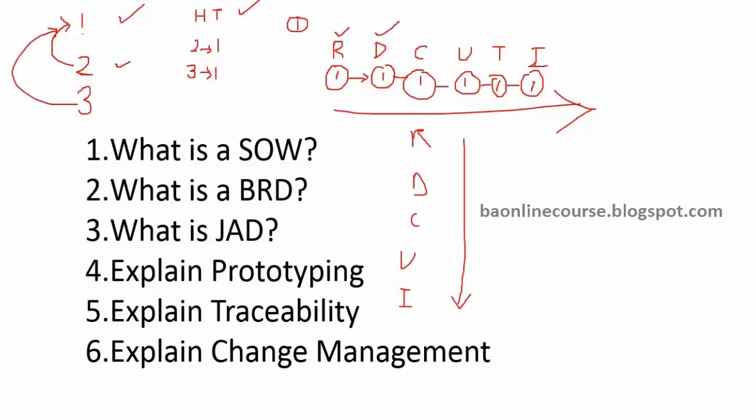Then you pick up the next phase, which is design documents. Now, when somebody is preparing the design documents, he also must make sure that the 1,000 requirements captured in the BRD are translated into the design documents. So he will prepare a checklist: these design documents will link to this particular requirement and capture that.